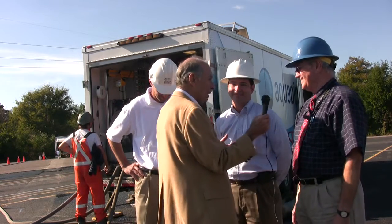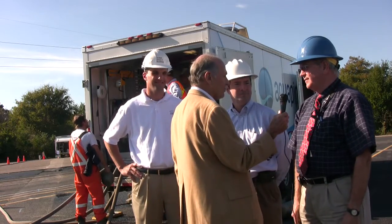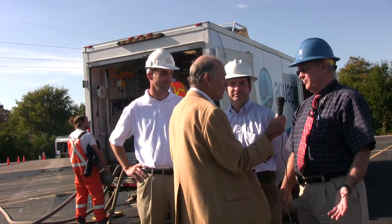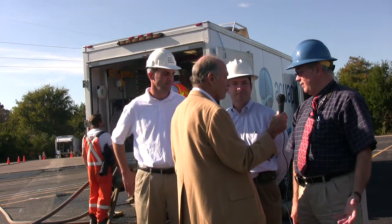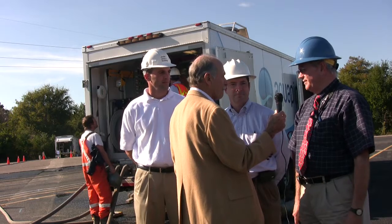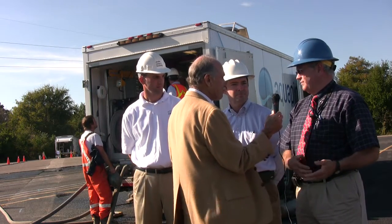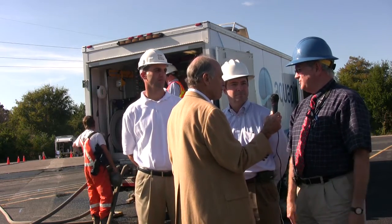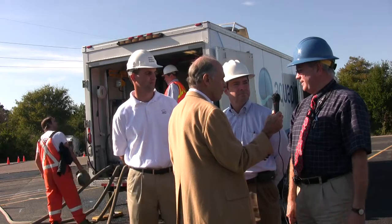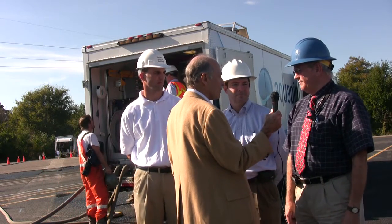Asset management is a very popular item nowadays in water distribution as well as sewage systems. You do have an active asset management program, obviously. Yes, we do. We have a full inventory of all of our underground infrastructure for our waste treatment plants and water treatment plants, and so we actively manage that. The water distribution department has an algorithm they use to determine which pipes need to be replaced and when. And that, along with coupon testing, gives us information as to where to best spend the limited resources that we have. Okay.